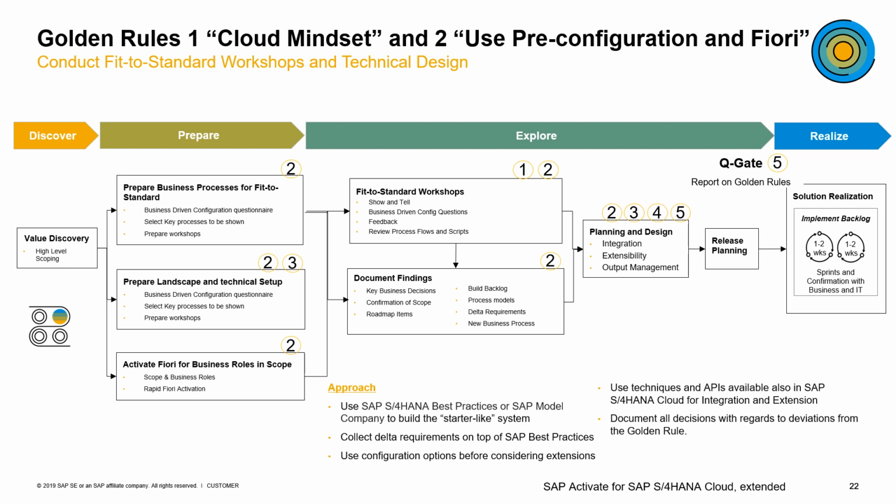We recommend using Solution Manager and Extended. You can view and adjust as needed. We want to document key business decisions and confirm the scope. We also want to ensure that the business understands the processes properly. They may make changes in the scoping decisions, and this is fine, as long as it is properly documented.